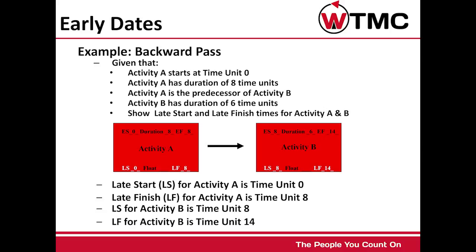Late start for activity A is time unit 0. Late finish for activity A is time unit 8. Late start for activity B is time unit 8. Late finish for activity B is time unit 14.